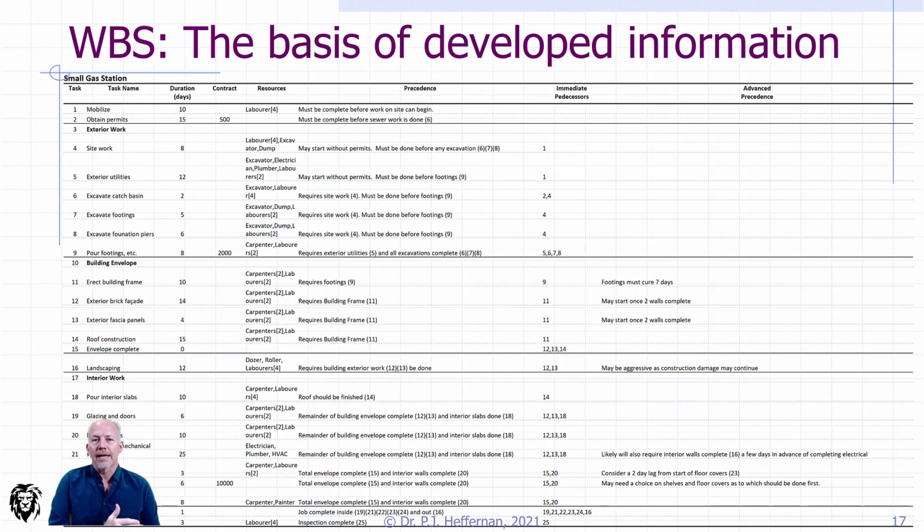This is our gas station example, once again, broken down, and this is just a snippet out of Excel. I'm actually a real fan of doing my work breakdown structure in Excel rather than in Microsoft Project. I find in Microsoft Project you get drawn into considering scheduling and all those other things before you're ready. By working in Excel, we can gather most of the information and do it in our little shell, our little space, our work package, and allow the integration to be looked at later on.